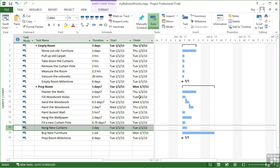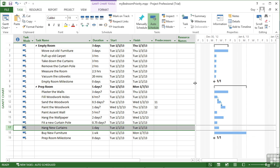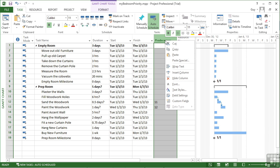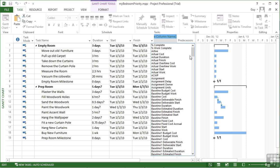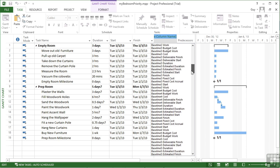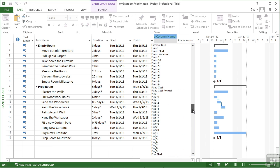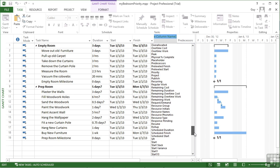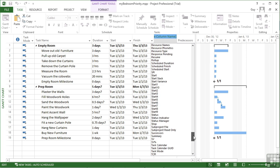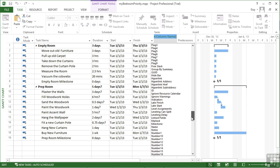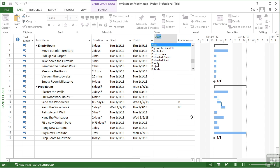Alternatively, we could add, if we move across a little, a column here that shows us the priority value. So we right-click a current column, choose insert column, and we're then given a list of all the available columns in Microsoft Project. And there are hundreds. Luckily, they're in alphabetical order, so I could type a P to jump down to the P's, and there's priority.